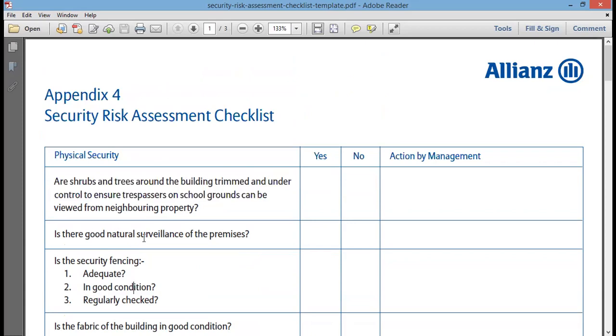Makes no difference whatever the project, as long as you've got a list of potential things that could go wrong. Now, you know where you could get these from? You could get these from the risk breakdown structure at the lowest level. In fact, if you read the PMBOK guide enough, you will come across the area where they tell you that your risk checklist could be the lowest level of the risk breakdown structure.